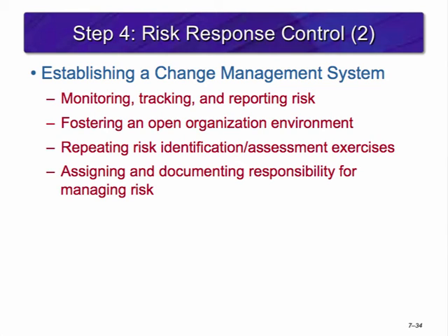Establishing a change management system to deal with events that require formal changes in the scope, budget, and/or schedule of the project is an essential element of risk control. Project managers need to monitor risks just like they track project progress. Risk assessment and updating needs to be part of every status meeting and should be documented on the risk register.